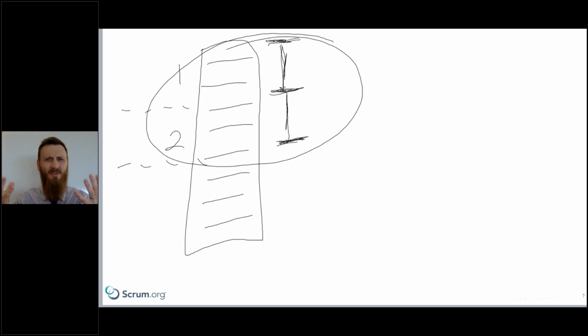And that's just essentially testing, acceptance criteria, requirements. They're all one and the same. So do you understand what's being asked for? Again, you might have a size component to it. You might have some of those items broken down because they might not fit within one sprint, so you've sliced them up. Those are refinement activities that you might do to get the top of the backlog in order.